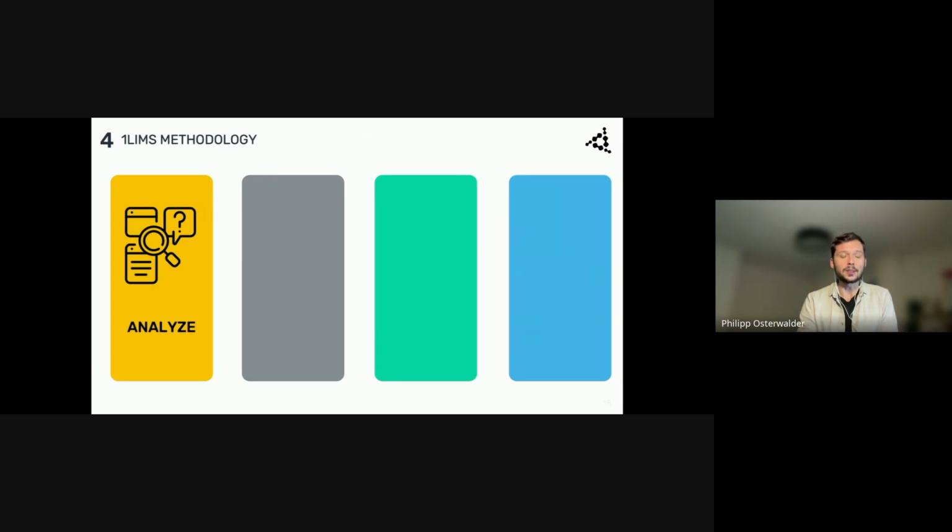We do it based on Lean Six Sigma tools like multi-moment analysis or the process map based on value stream mapping and SIPOC. And then we evaluate the bottlenecks and create an action plan, an implementation plan, together with clients to define a roadmap and a timeline. This is our fundamental stage. This is where the success of the digitalization project and also the LIMS implementation starts.